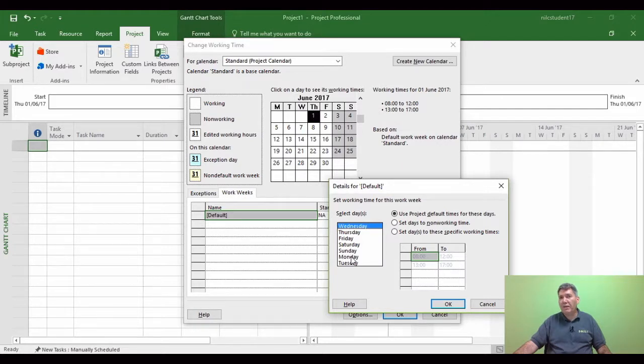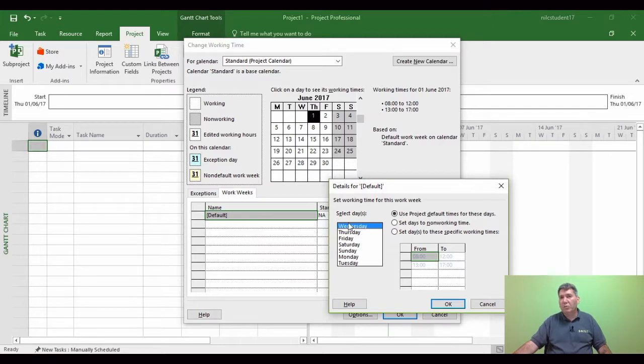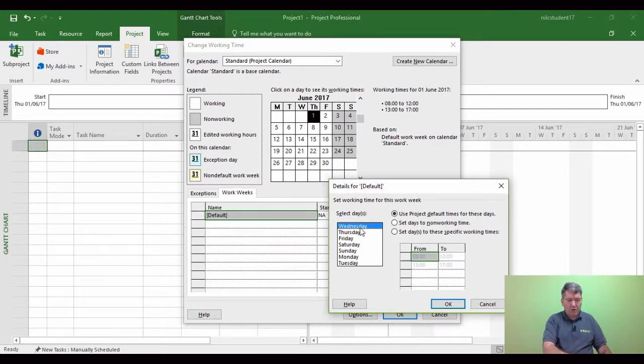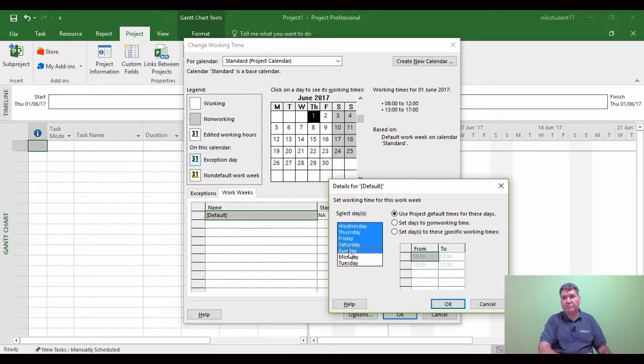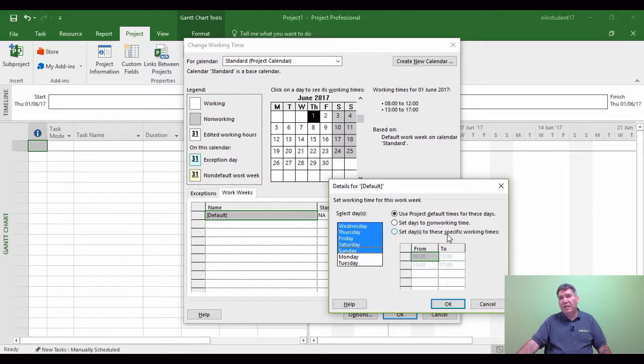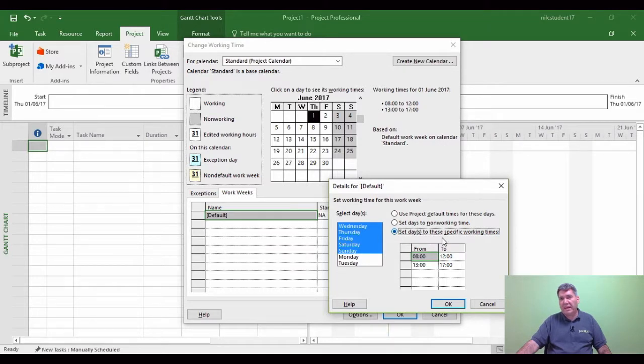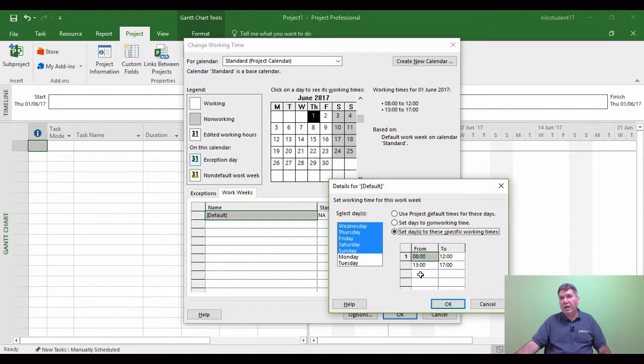Now I might want this particular project to work Wednesday to a Sunday, whereby Monday and Tuesday are actually non-working in this example. So with Wednesday highlighted, I'm going to hold my Shift key down, and I'm going to click on Sunday. I'm now going to set the third option to control calendars. So I'm going to click the third option, set days to these specific working times.